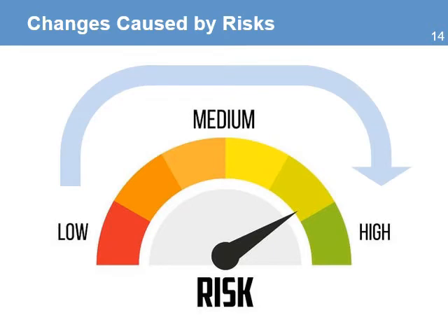A risk is an uncertain event or condition that, if it occurs, will have a negative impact on the project's objectives. Because of its uncertainty, risks can change over the life of the project. During the planning phase, a risk may have been evaluated to have a low risk factor, but it can change later and become a high risk factor. New risks are also going to be discovered, and that will create the need to develop actions to avoid or reduce the impact of the risk. This means changes to the schedule, budget, and even scope.